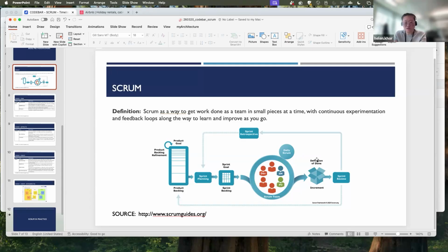I have ensured that it's written with React and TypeScript. I have unit tested it. I've maybe used it in practice to make sure it adheres to requirements. And another one could be adding it into my Storybook. So yeah, it really depends. Each developer will need to have their own definition of done.